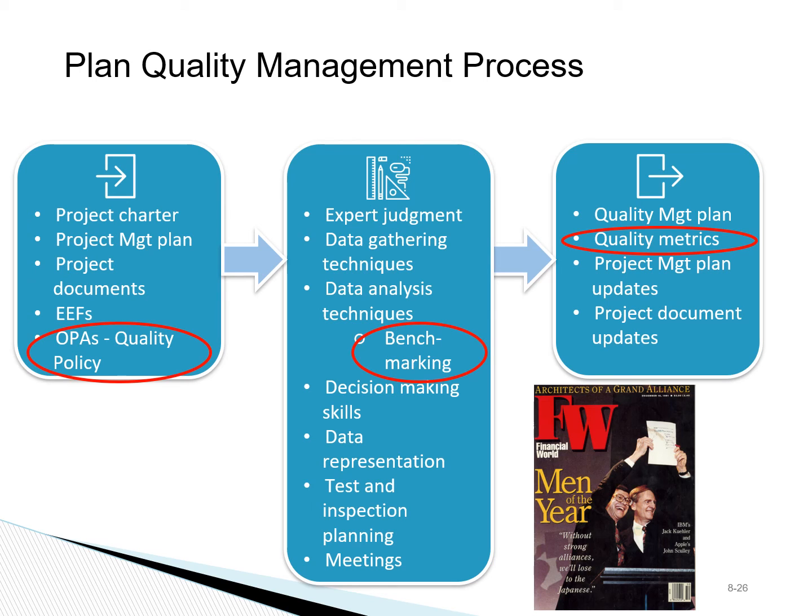These benchmarking studies highlighted some issues, and after we looked at root causes and revised our project management process, eventually we were able to save millions of dollars at Chevron by improved processes. There is an article that you can see, published by Financial World magazine, that featured that effort in Chevron. You have a link to it if you're interested to read it.